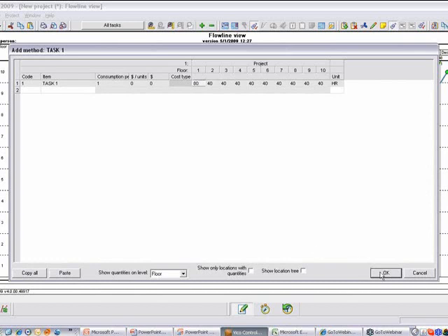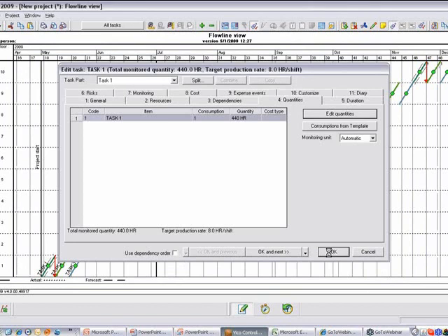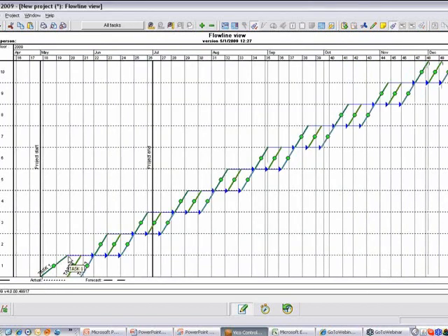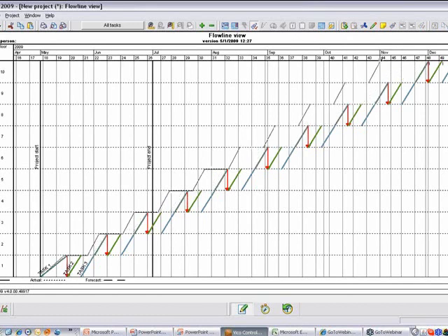And as I do that, the line automatically updates and shows me the impact of that new duration based on a new quantity on the overall schedule, and I can see where my date is. If you need to meet a date and you want to match, let's say, the beginning of November as a target date, or let's say beginning of October,